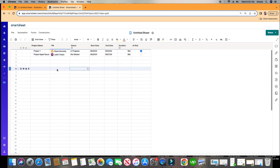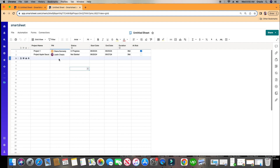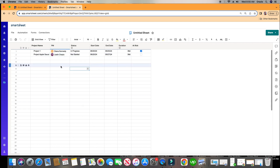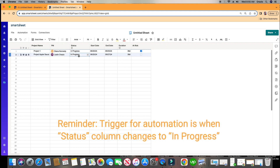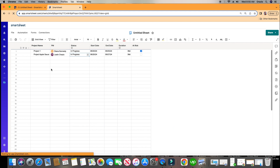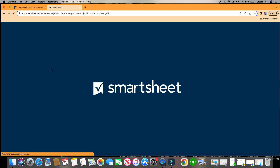So you can do this when you have 20, 50, or 100 rows of information. All of those status updates will automatically be sent to all the PMs based on our trigger, which is whenever status changes to In Progress. I'll click Save on this, and once I refresh, the automation will run in real time — it's not a test.